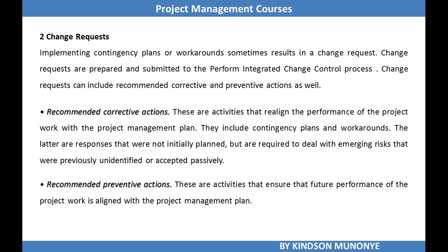You also have change requests. This is very clear because implementing contingency plans or workarounds sometimes results in a change request. The term workaround is very important. A workaround is a response that you implement to handle a risk that has occurred, and this response was not planned. What it means is that something goes wrong, and without going back to your risk register, you quickly solve the problem as a workaround. So that is one thing that might happen during control risks.